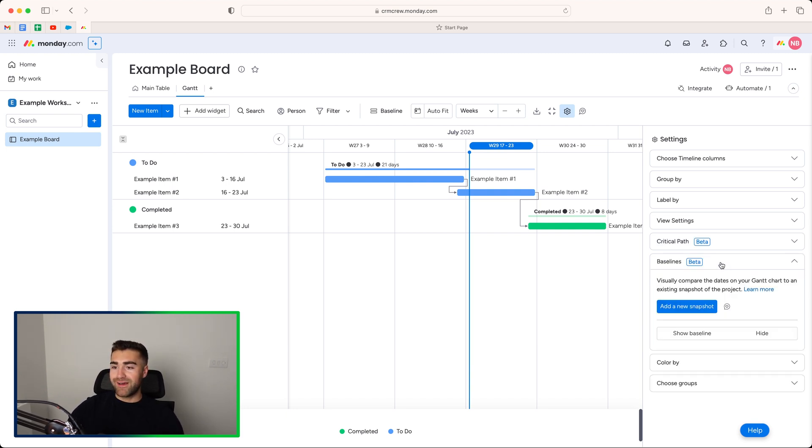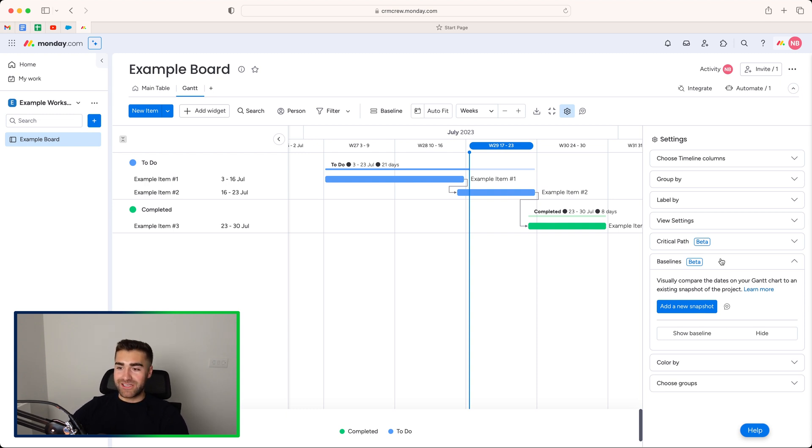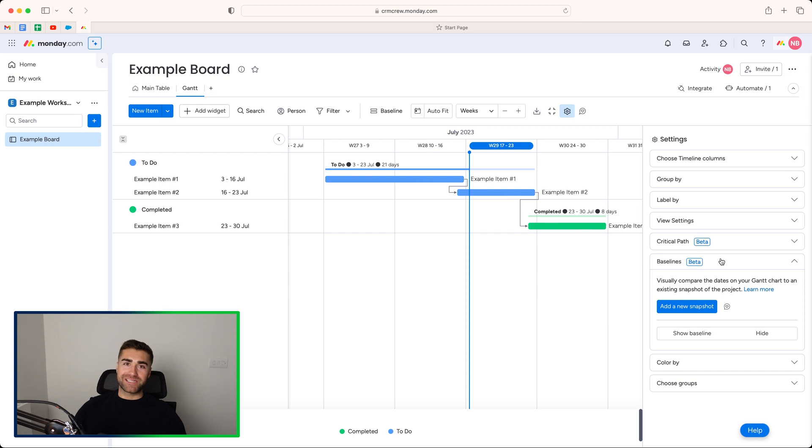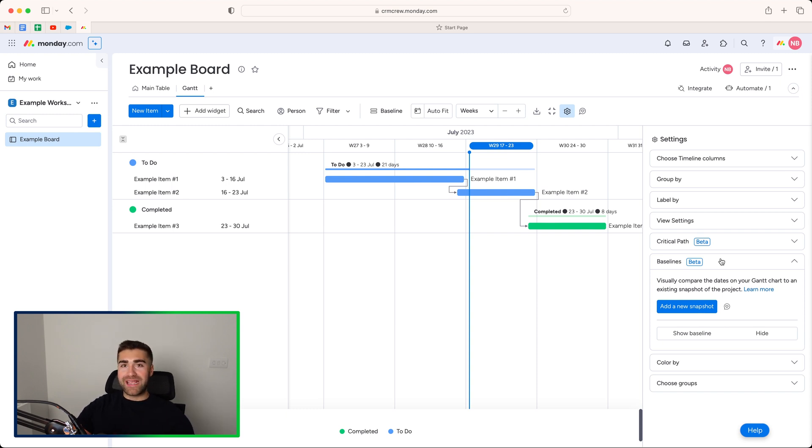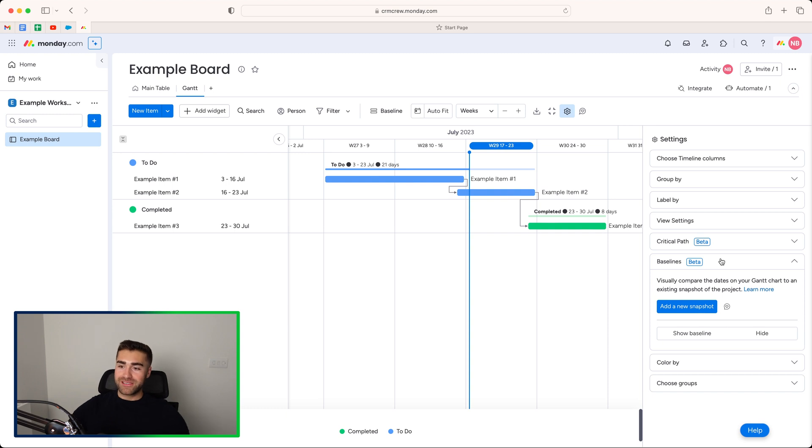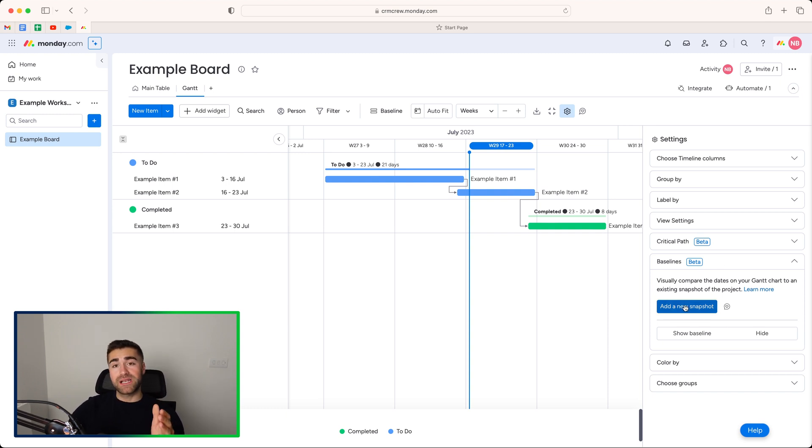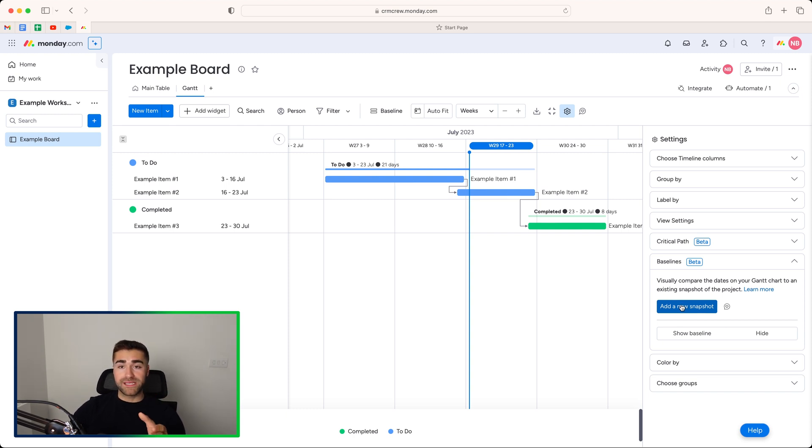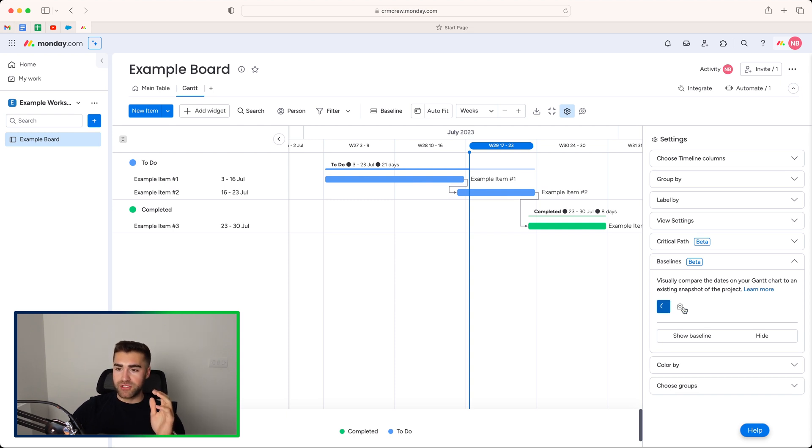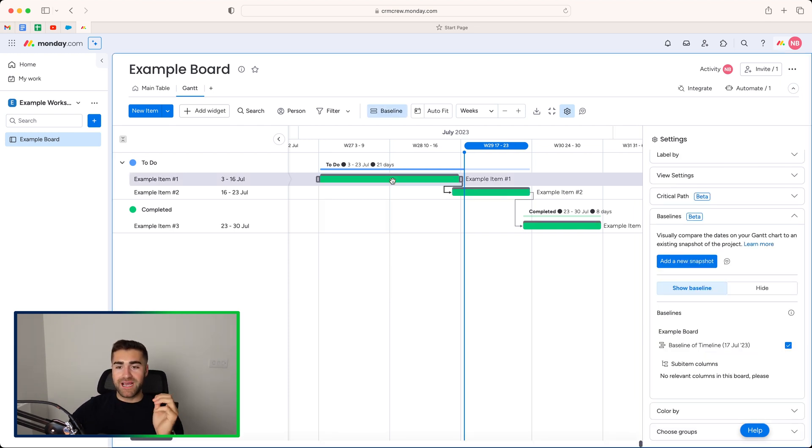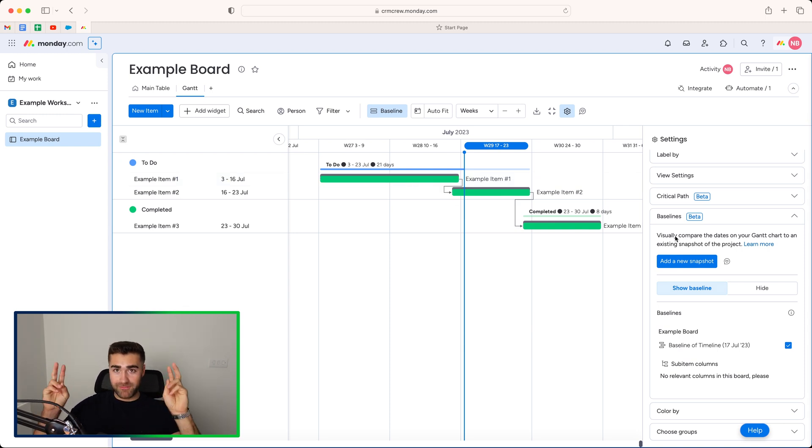We then have baselines. This is another unbelievably useful feature. So as we all know, projects do get delayed. Unfortunately, it does happen. What you can do is you can create a baseline and this will then allow you to see how far off your project has gone. So if I go ahead and press add new snapshot. Now, just bear in mind, if you do select this option, it's going to create two new columns on your main table board. And I'll show you in a moment what that looks like. So if you go ahead and press add new snapshot, that will take a snapshot of what the timelines currently look like at the moment you took the snapshot photo.